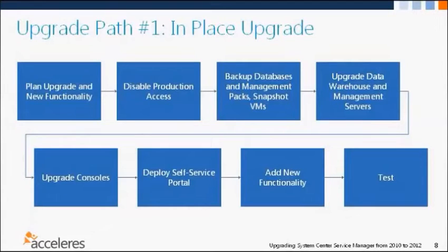And there's also planning on the actual technical side with the upgrade itself. You want to make sure you've got a robust, validated backup plan, so that because it is a big bang upgrade, you know that if there is an issue, if your upgrade fails, you've got a reliable way of moving back to your 2010 version so you can give it a second go. And that you know specifically what that is.